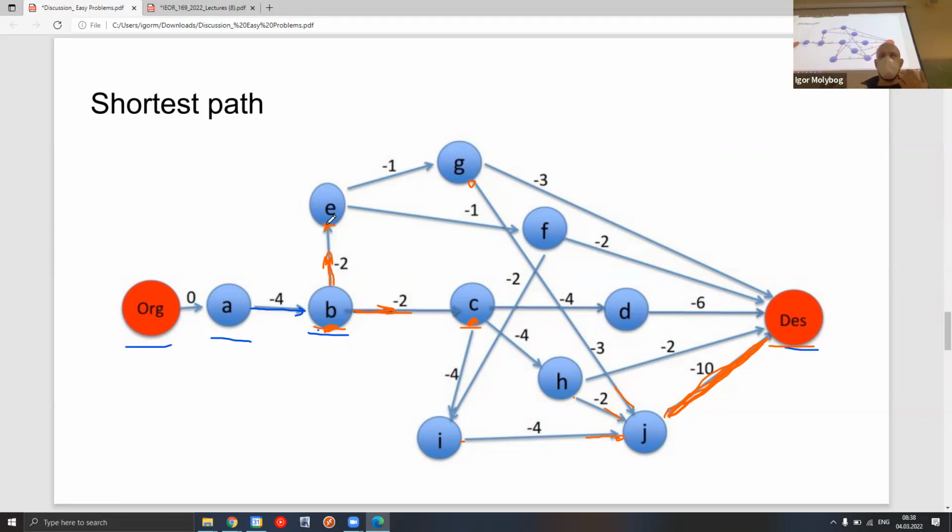And finding the longest path from S to T is basically the same thing as finding the shortest path if you negate the cost of each arc, because this is from maximization to minimization. The negation of a minimization is the same as maximization of negation, right?